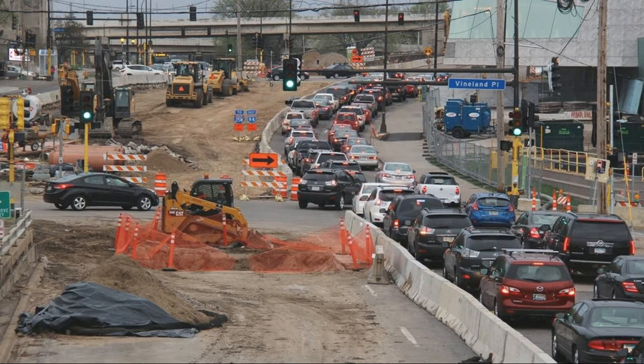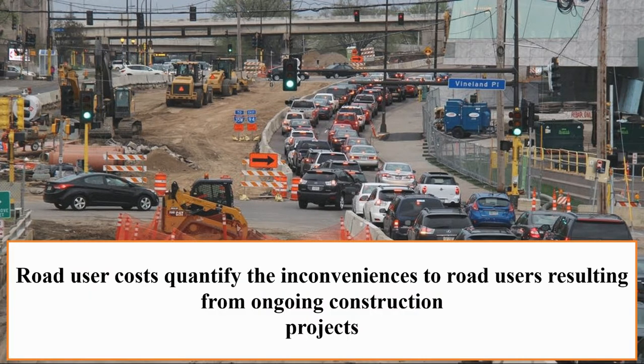However, these inconveniences which road users face are not typically given more attention when planning, developing, and awarding either construction and maintenance project contracts to contractors. And that is where the concept of road users costs comes in, where road users costs quantify these inconveniences into monetary values.